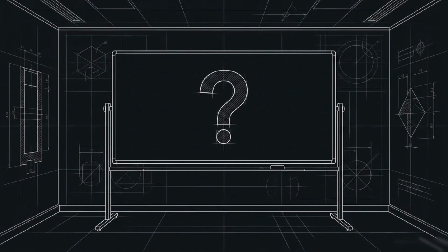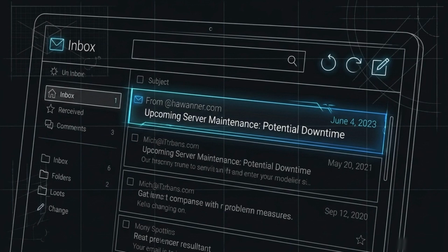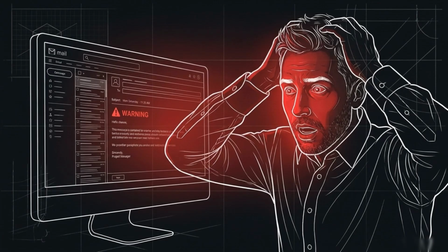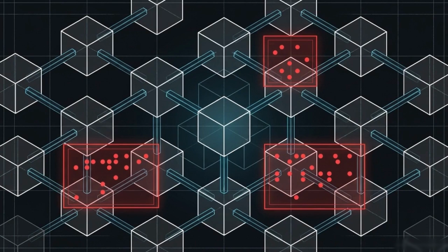A risk is also distinct from generalized uncertainty. Uncertainty is a situation where the outcome is entirely unknown. A risk is a specific uncertain event with a defined potential impact. Misclassifying a risk as a problem destroys your ability to prepare. You cannot build a contingency plan for a threat you are treating as an already occurring disaster. To apply systematic control to these threats, engineers must first classify them into specific failure domains.